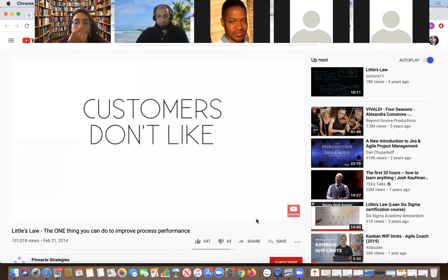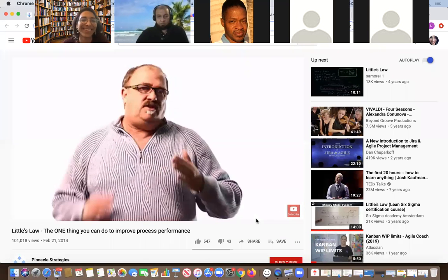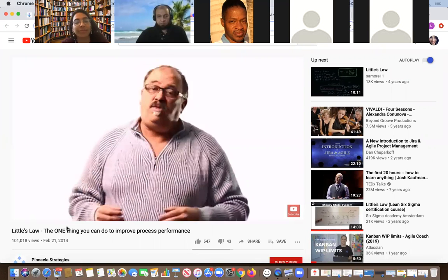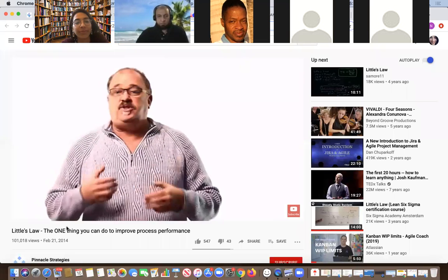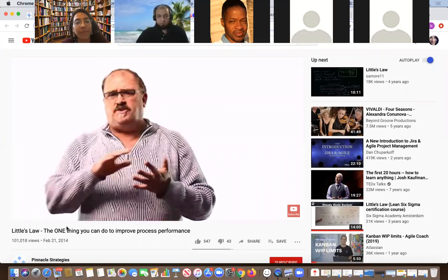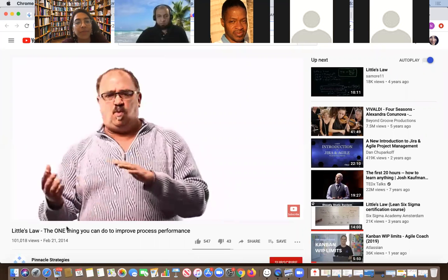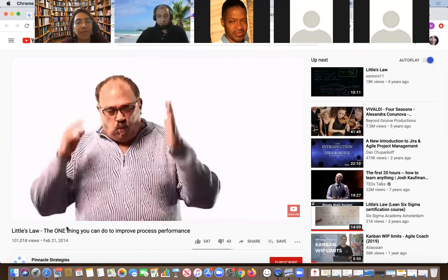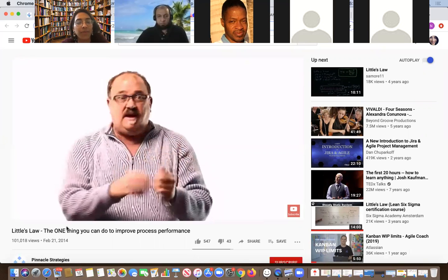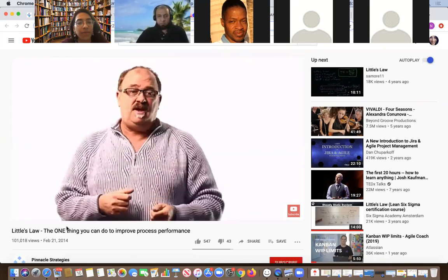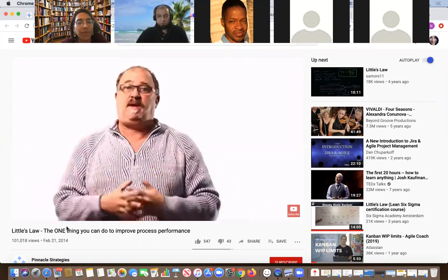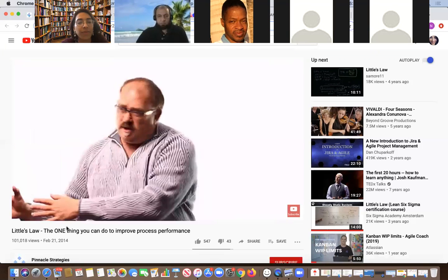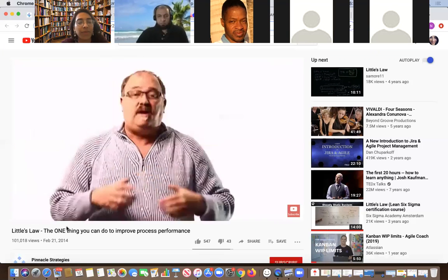Customers don't like waiting. Now, not only does that affect customers, it affects the people in the process. When there's too much workload, the work priority system breaks down, and that results in extra work sorting and resorting work. Managers spend all of their time in meetings figuring out what's the most important thing to do today, and then where is it? Resources, those who are responsible for doing the work, have to stop working on one thing, start working on another thing, and then come back and start working on something else.